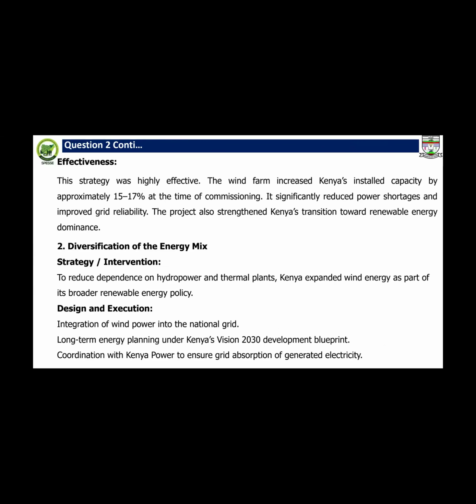The effectiveness: this strategy was highly effective because the wind farm increased Kenya's installed capacity by approximately 15 to 17% at the time of commissioning. It significantly reduced power shortages and improved grid reliability. The project also strengthened Kenya's transition towards renewable energy dominance. Diversification of the energy mix, strategy and intervention.